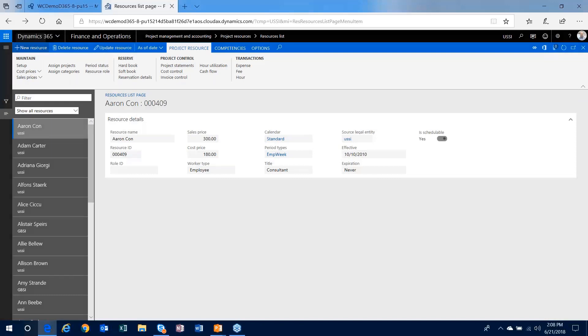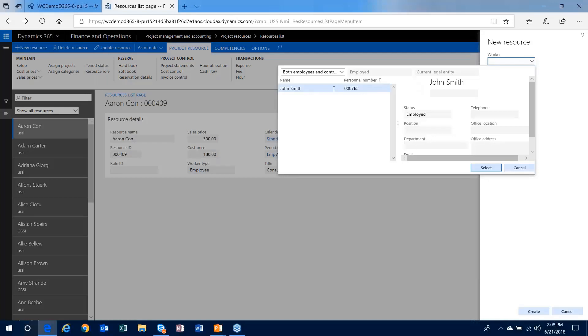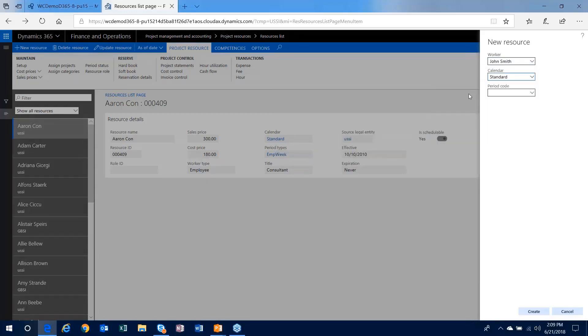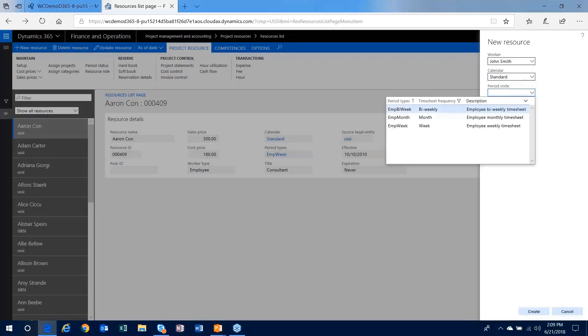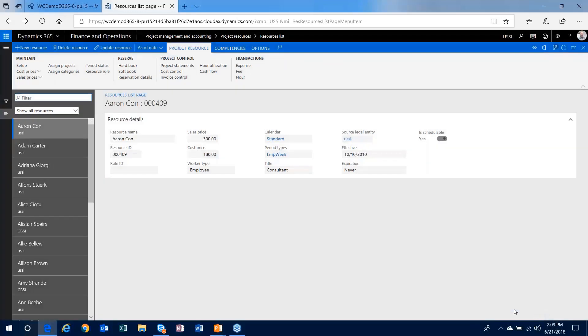And I'll create a new resource. And what you're presented with is essentially the worker drop-down, and it'll be anybody not already been set up as a resource in the system. So that's the one I just created. We're going to assign him a default calendar. So I'll assign him that standard calendar and the period code, which would basically be his timesheet period code. And then I can create that resource.